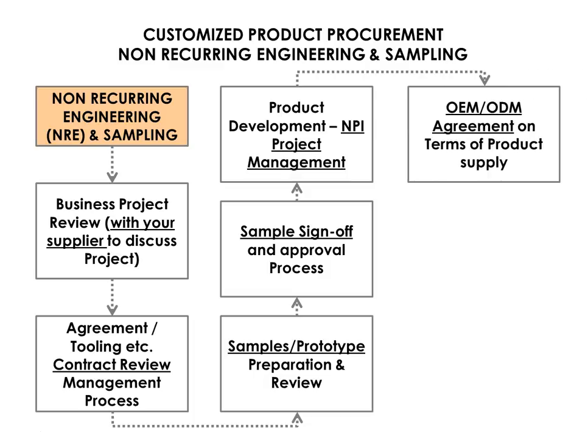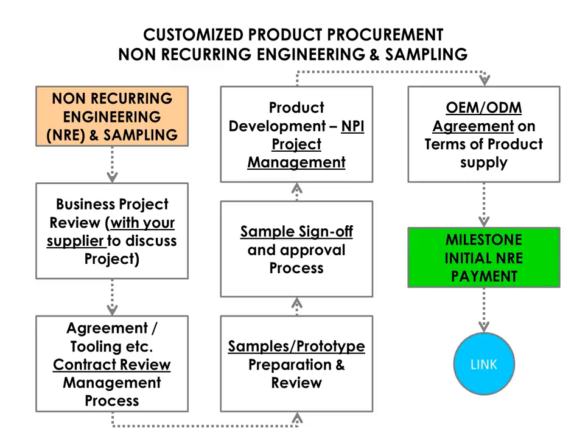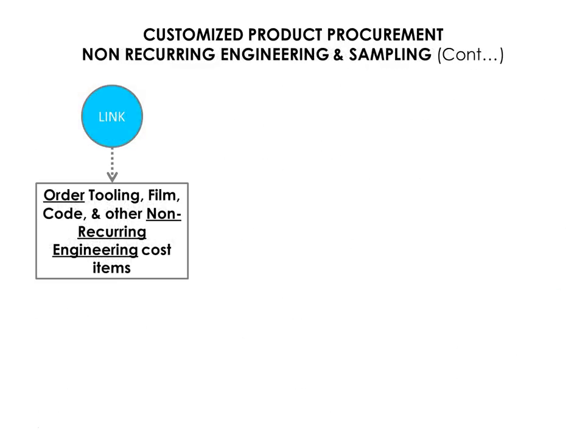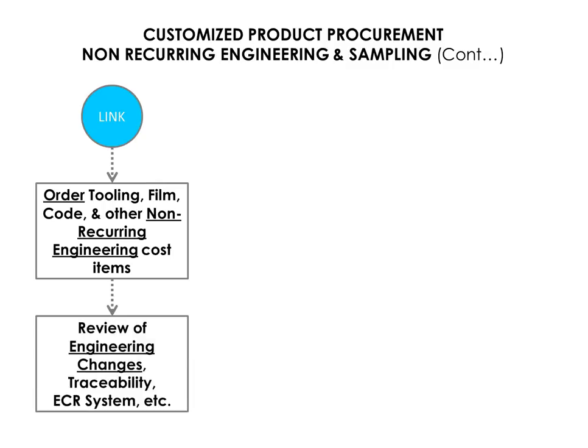An OEM-ODM agreement should be created that covers every detail of the product supply. This will be your manufacturing contract once you are ready to hit the green light. Once these steps have been completed, it is time to place the order and pay the initial amount set against the PO for your NRE items. Once you place the orders for tooling, films or code, the information provided would have been officially released through your document control procedure.